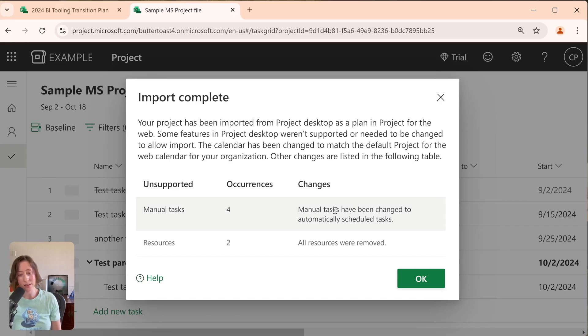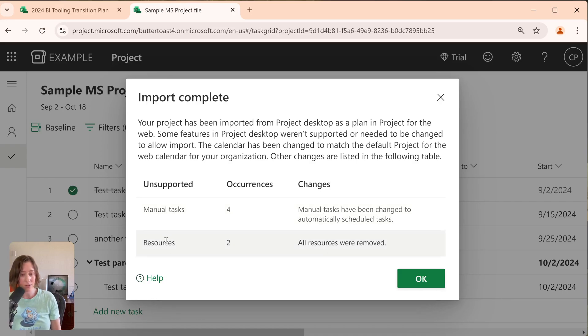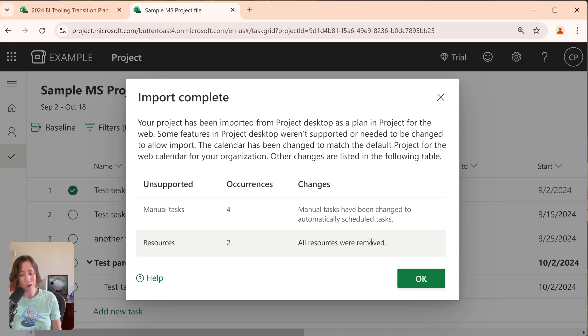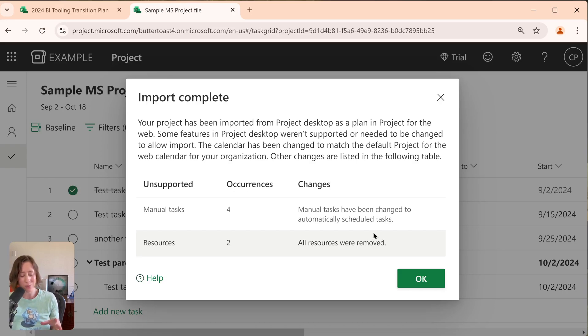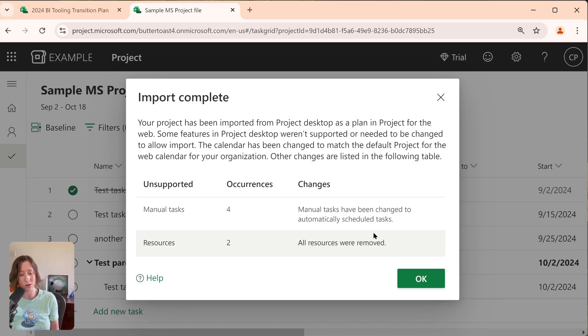You'll notice that it tells me which things weren't migrated over. So manual tasks have been changed to automatically scheduled tasks, and the resources were removed. So Project Desktop doesn't know who people are. So you can add resources as named items, but it's not looking up to their ID or anything like that. I tried a few different methods to see if I could get it to import. So like I tried putting in the user principal name or email address. It still didn't import those.